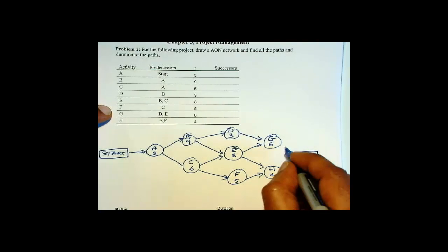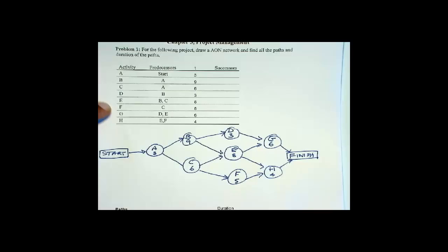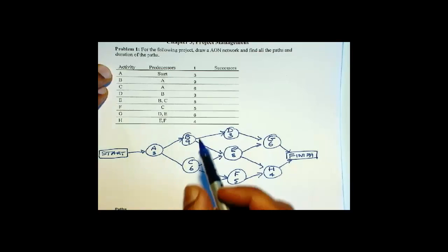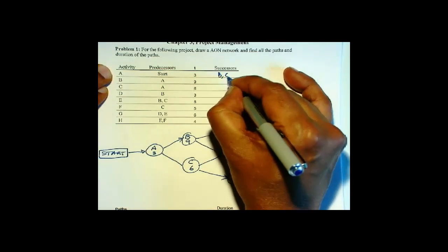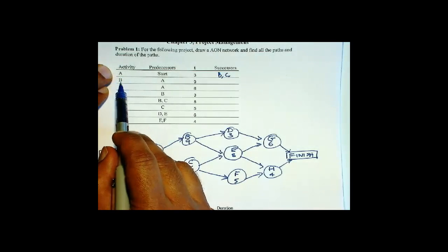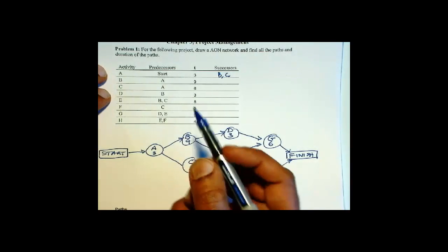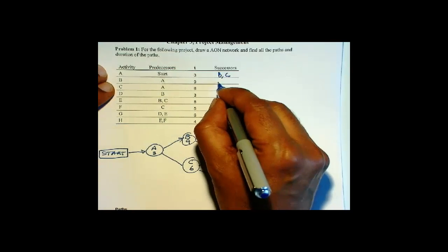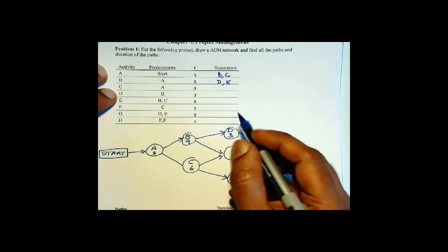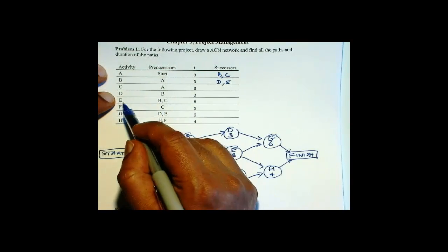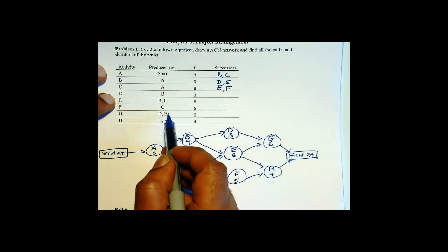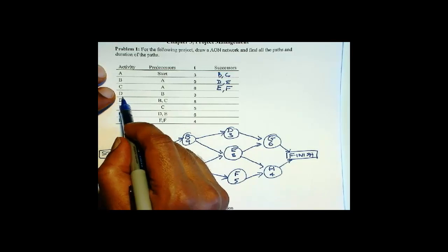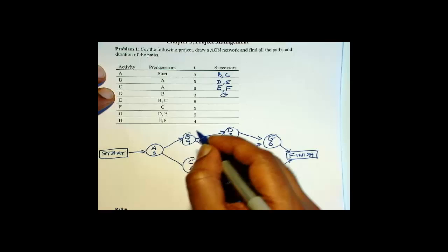Now with this we can set up the successors. So A's successors are B and C — we can verify that by looking at what activities A is a predecessor for: B and C. Then B is a predecessor for D and E. C is a predecessor for E and F, and you can verify that here also. D is a predecessor only for G. And E is a predecessor for G and H.